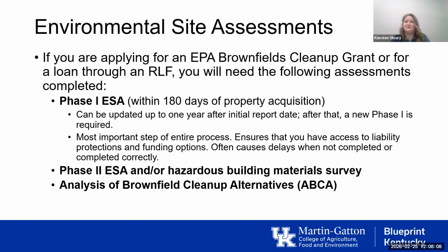Some we've run into, like a partnership that has passed a property back and forth, and a Phase One is needed every single time. That due diligence step is needed every single time you pass that property back and forth to ensure you have those. So just be very mindful of that.